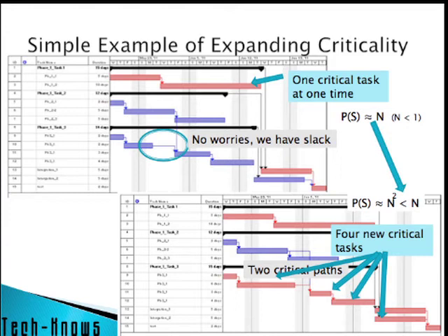Well, what happens is that the designer working on task 2 runs into some trouble, and the boss goes, wow, this is no good. We can't start off with this trouble right away. So he takes a person who has just completed task 9 and says, go help the guy on task 2. You've got slack on your next task. So he does that, and they work really hard, and they just managed to hold that date.